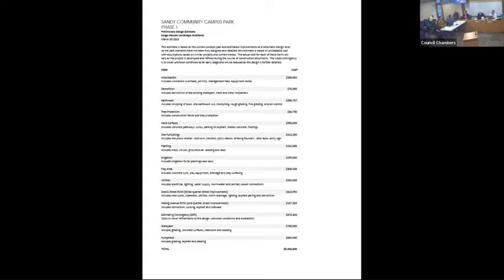And just a note in terms of how we go about this, we've taken other parks which are similar in size, similar elements, and used that as a guide for many of these estimates. We've also made some assumptions. For some things like utilities, we don't know exactly what the linear foot of piping is going to be, so we've made some general assumptions for that.